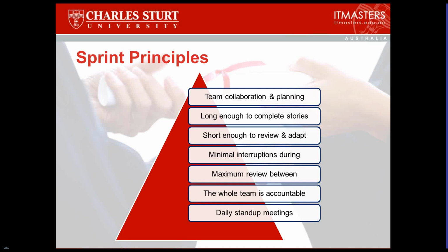So in Scrum, the product owner is generally responsible for the financial success of the vision and its value at the end. So whether or not you make money out of this, which is typically what we're all here to do, and whether or not it's financially viable and successful or business viable, that comes down to the product owner. So that aspect of accountability lies there. So what it means, though, is that we're separating the roles. It's not up to the product owner to worry on a daily basis exactly how things are being done. We've separated that out. So it's the two roles combined, but handled separately and recognized separately.